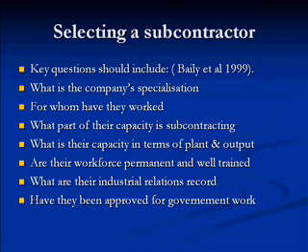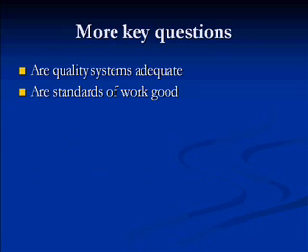That will talk about the quality and the reliability of that particular vendor. That will tell me that if I give the work to this person, he can make sure the work is delivered to me in the required specified time. He can manage the lead time, and he can provide me the work with good quality. So it indicates whether they are able to meet their previous commitments or not.